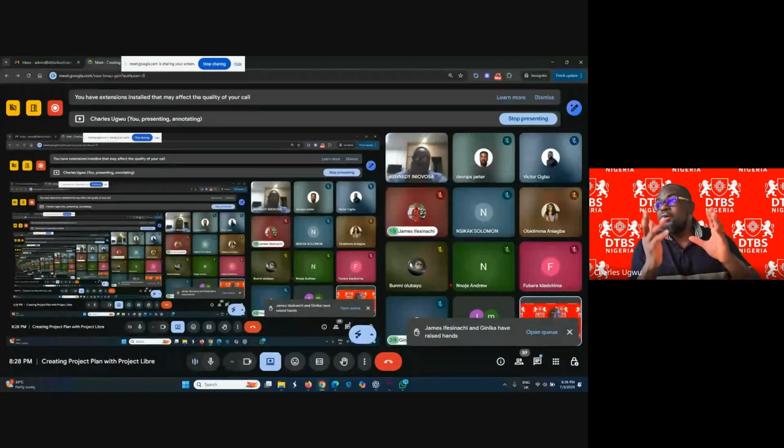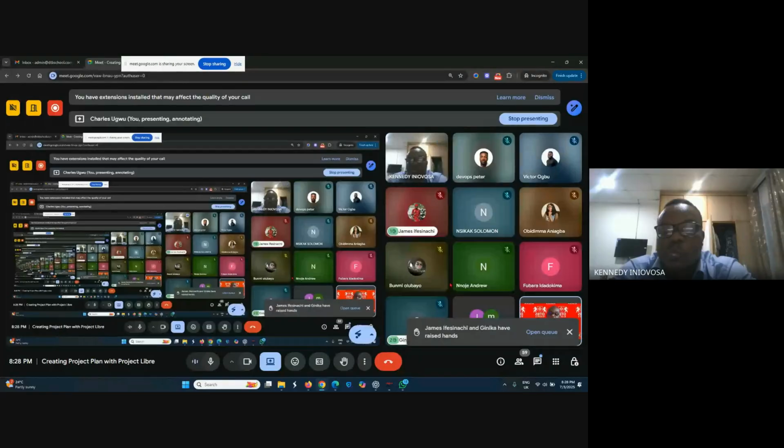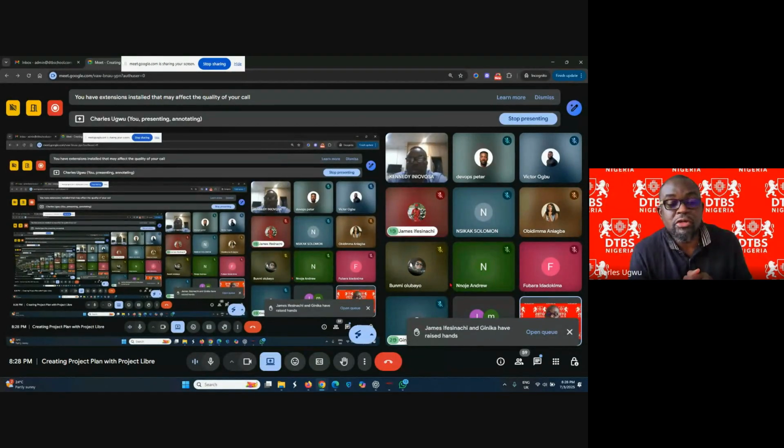So if you say we have a poor educational system in Enugu State, we need to build a smart school. Is that not a solution? Yes, it's going to involve construction. The business analyst must have evaluated how much it's going to cost to build a building. And before they come and draft a project charter, they must have done a feasibility study and written a business case. The business case would cover all these things.